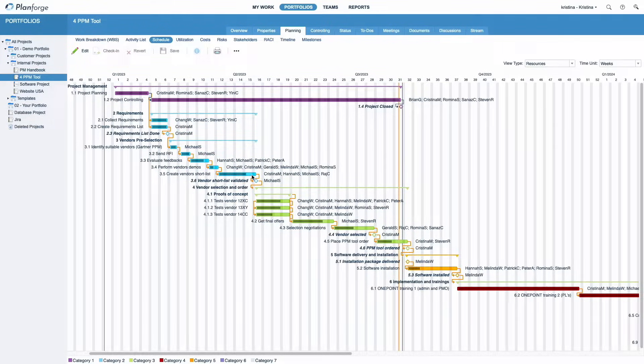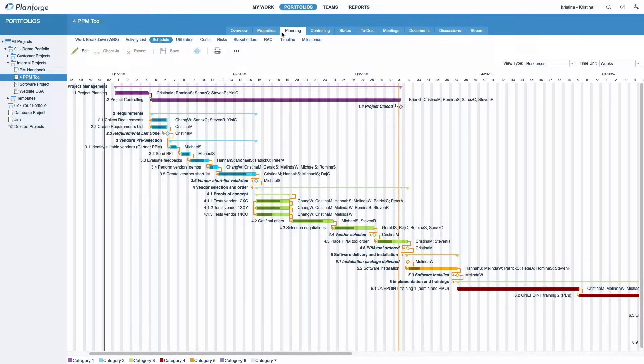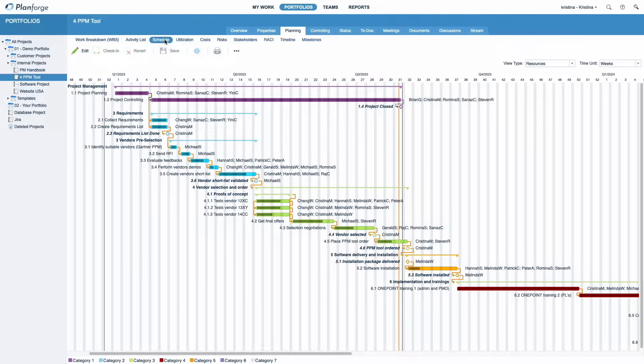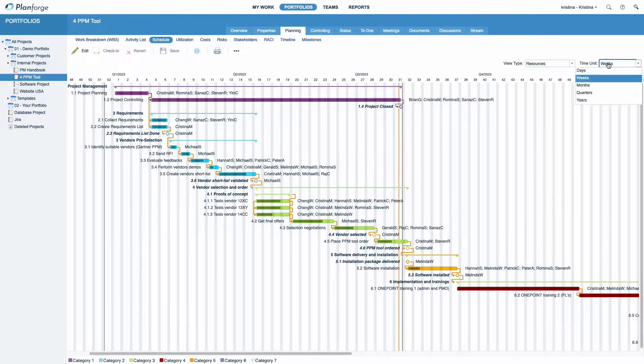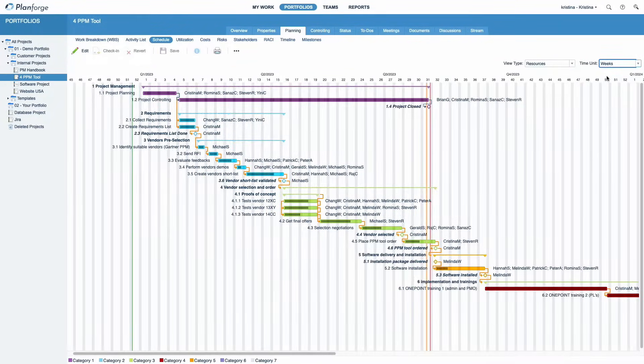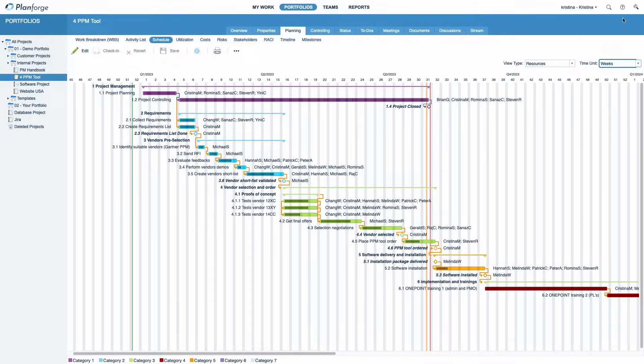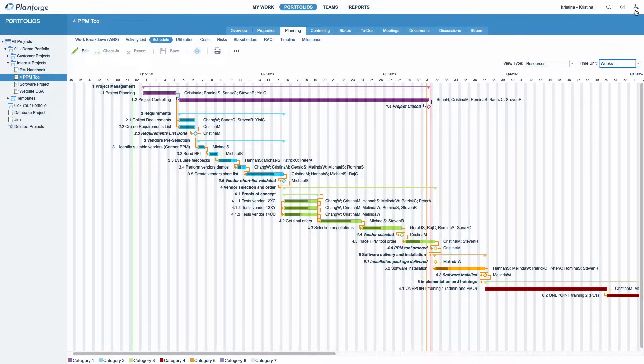To view your schedule, select a project, go to Planning and click Schedule. Choose the preferred time unit in which your schedule should be displayed. Please note that you can also pre-select a default time unit in your user preferences.